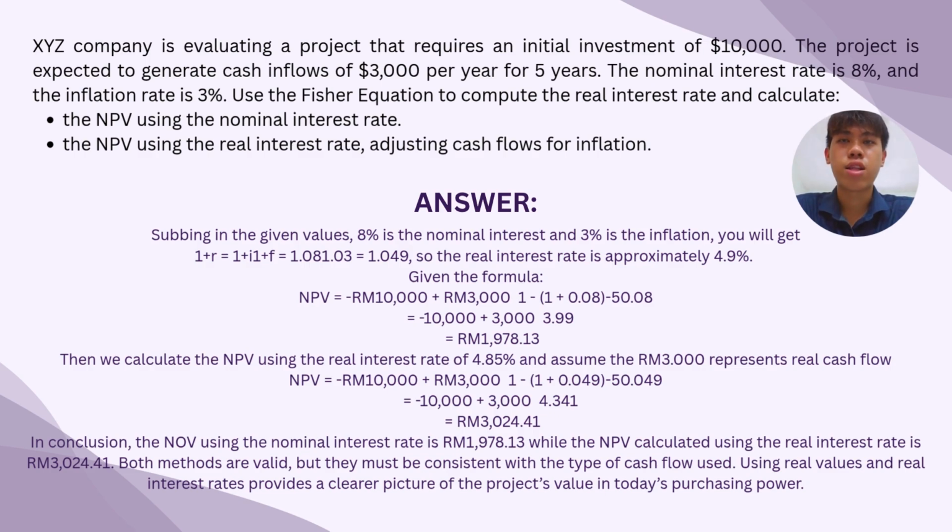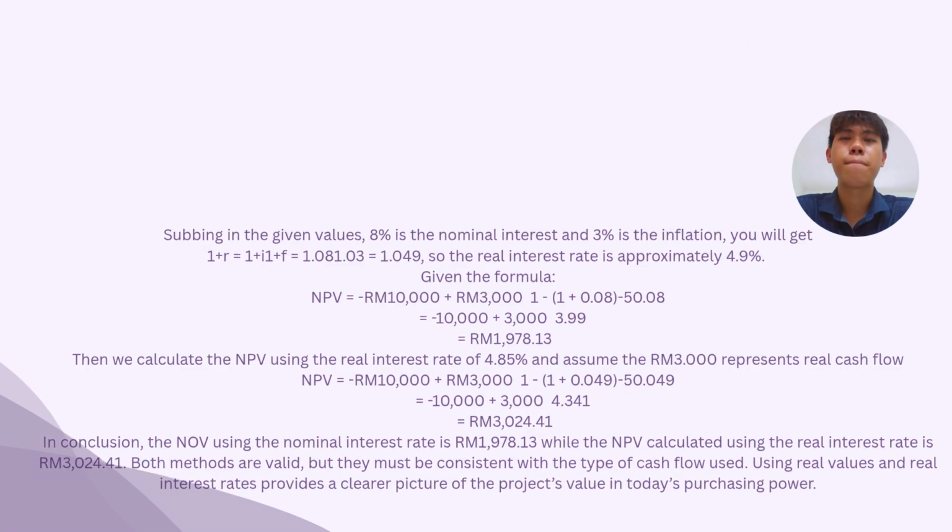Both approaches are valid as long as they are used consistently with the type of cash flow, nominal with nominal and real with real. However, calculating NPV using the real cash flows or the real interest rate offers a clearer understanding of the project's true value in today's purchasing power.